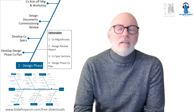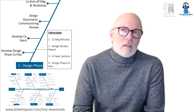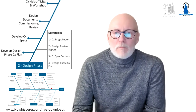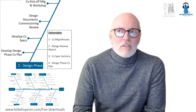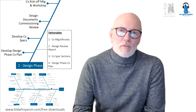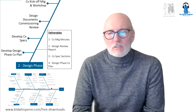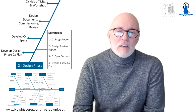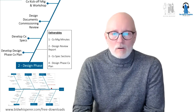That's the 80%. There's also 2 consequential benefits to this review. One is that we're a second pair of eyes. If there are errors and omissions that have been missed, we can pick them up if we see them, and we can report them, and hopefully they can be fixed. And if there's any poor engineering practice we see, an example of this is if you see 10-foot, 20-foot flexible ducts, that is not a good idea. It generates noise, generates resistance, it's bad engineering practice. There's no code that says you can't do that. It's an opinion. But we also note those, and that's for the engineer of record to decide whether they accept things like that or not.